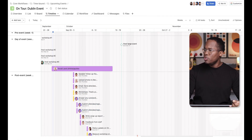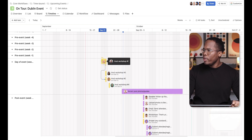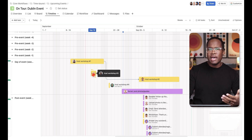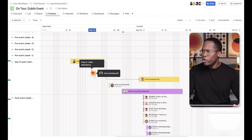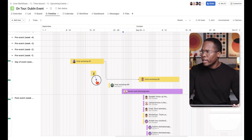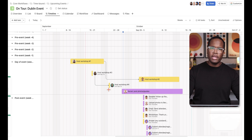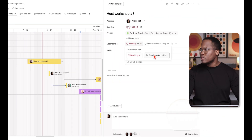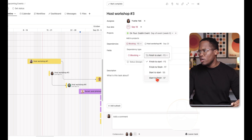Going back to the timeline, you can also create dependencies visually. You hover over a task in the timeline or Gantt view and you'll see little nodes pop up on the end — simply click and drag to the task you want to create that dependency between. You have a few options: finish to start, finish to finish, start to start, or start to finish. This is great for identifying the critical path through dependencies.